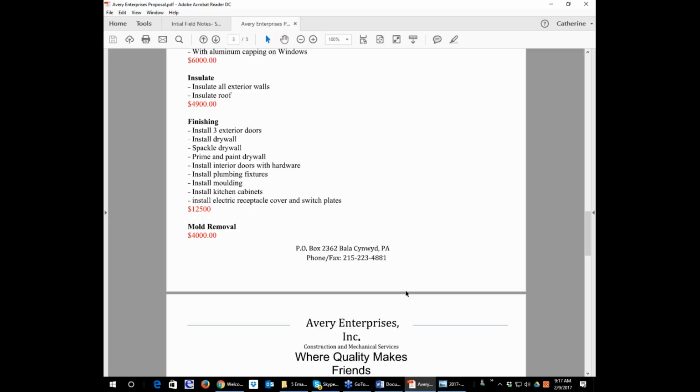What I'm going to need to know is, do you care where I put the money, as long as you get the total by the end of the project? Bearing in mind that when you are working with this program, you will only be paid when I come out and inspect work that's done, based upon line items in the scope of work. So now I always get the question back: well, does the whole item have to be totally finished before I can get paid? I said no.